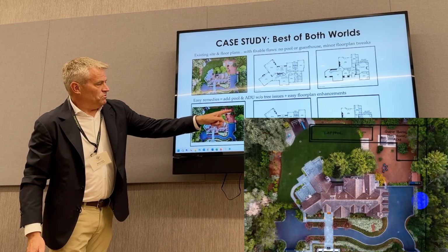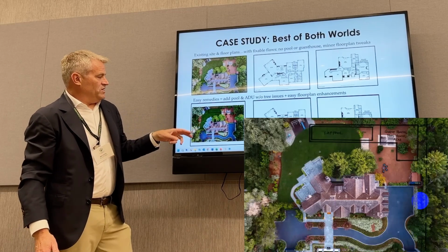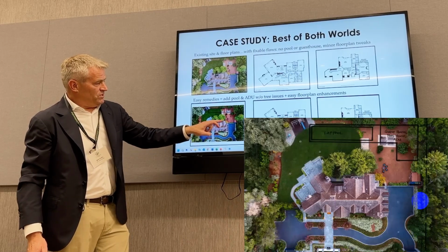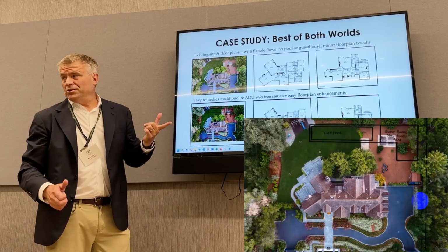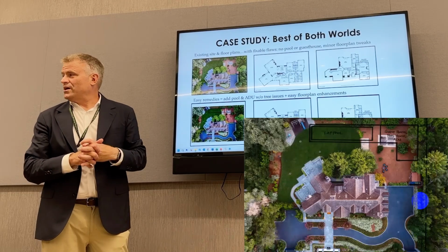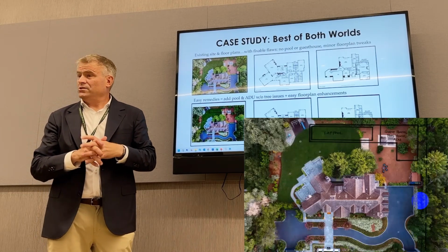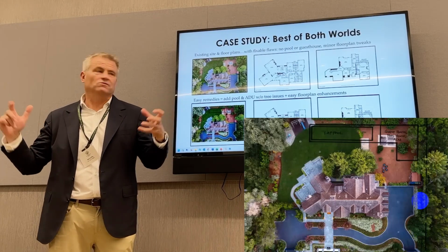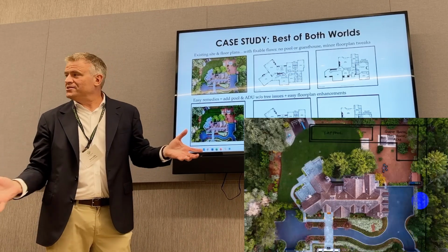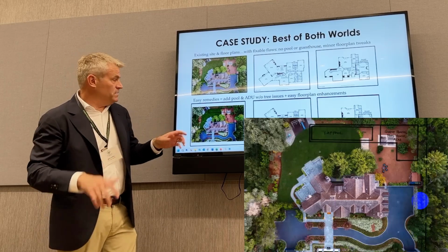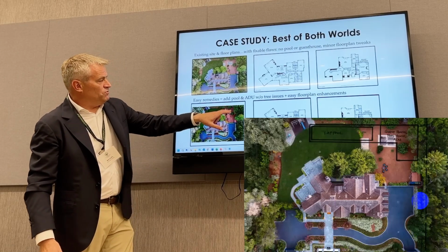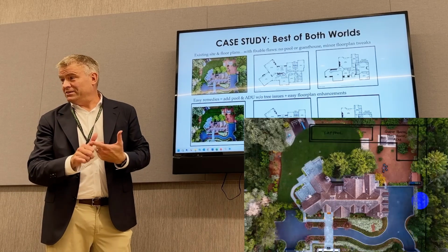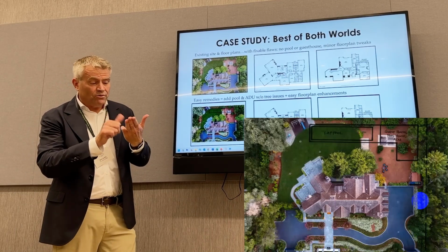This allows you, and the reason I said the advantages, there's a couple things for schedule, is you're staying within the existing envelope, which someone else mentioned earlier is the fast track way of doing a remodel. It can be much faster because you're not asking the planning department for a lot of neighbor impacts and so forth. It's not over the counter, nothing is anymore, but it's the next best thing. And then any of the new construction, if you can call that an ADU, if it walks like a duck, talks like a duck, it's kind of a duck,